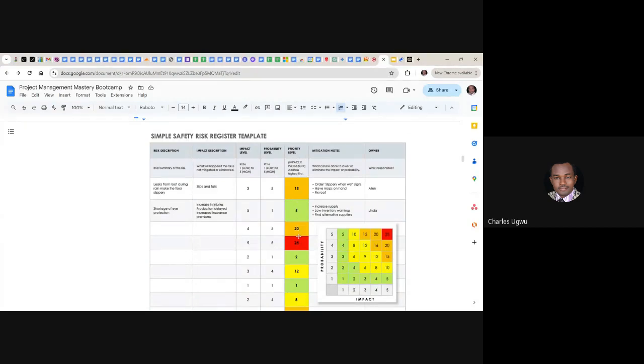But you can see coming down here, some risks getting away from the orange and into the red state. A red state like 25 means that everything the team members are doing, everybody needs to put it down and focus on finding a solution to this risk, because a risk within a project which is 25 is critical.